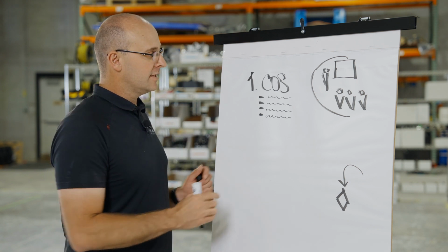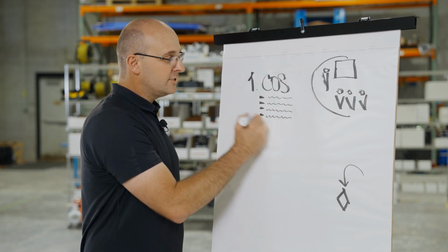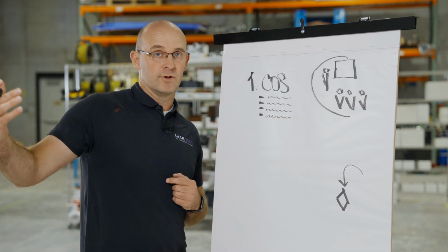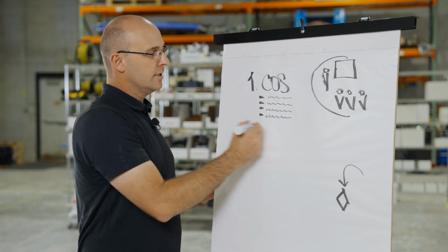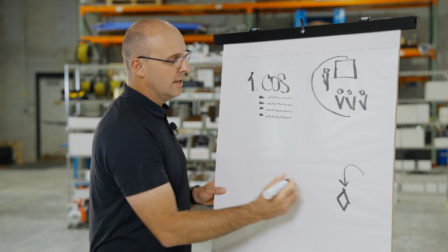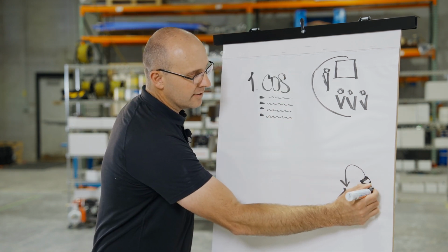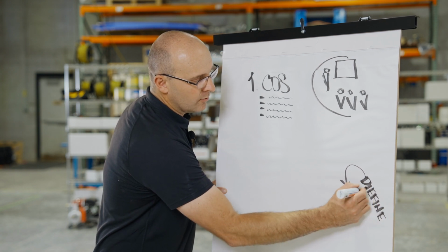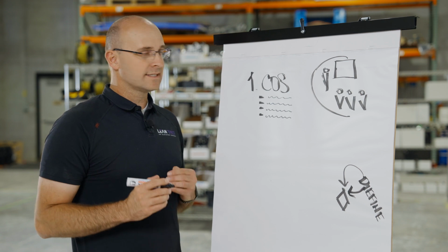So you see what I've done there in that example. If we do this, I, as the general contractor, and our customer will be satisfied. So this is called the conditions of satisfaction, and it's when we really define that milestone and we really get clear about what we want. Okay, so that's step number one.